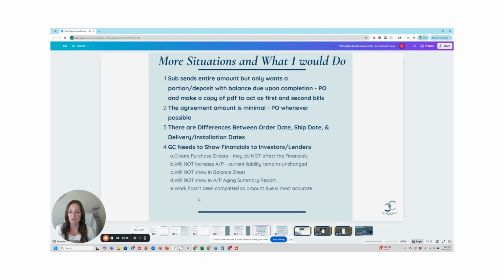And then once the material has been delivered, or it has been delivered and installed, and they send us a final, then I will attach that to the purchase order. And often there is a difference, especially if it includes installation. They may have used less labor or more labor. And so we may save on that future cost, but if they overbill us, then I can draw that to the project manager's attention and ask whether we should push back on the extra labor that they are trying to bill us for.